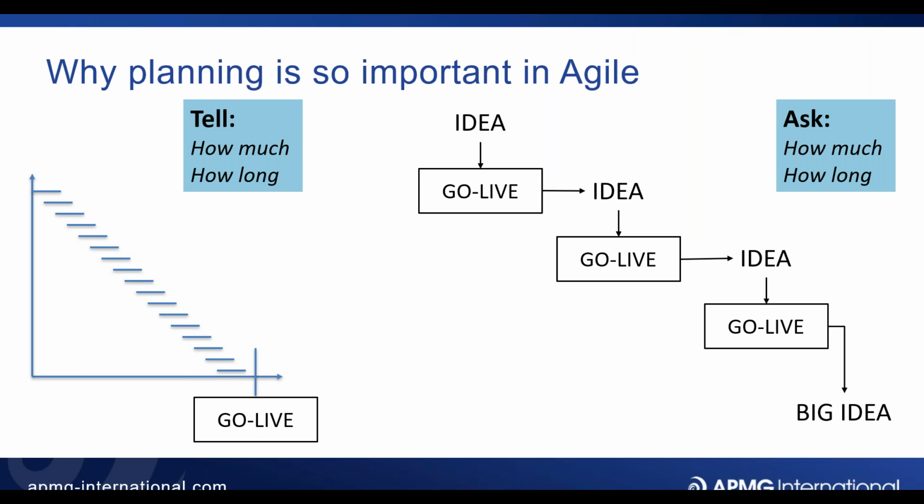So I think it's always worth having your checklist of questions you want to ask. And also think about the decomposition of your big idea, like a product breakdown structure, where you break it down, and then you break it down, and then you break it down. You can go to quite a micro level if you want to, but just have a look at that and ask: if we go to really little changes and we keep putting those into the business, they have to keep gearing up for announcing change and telling people how their jobs are going to change. How many times do they reasonably want to do that on top of everything else?